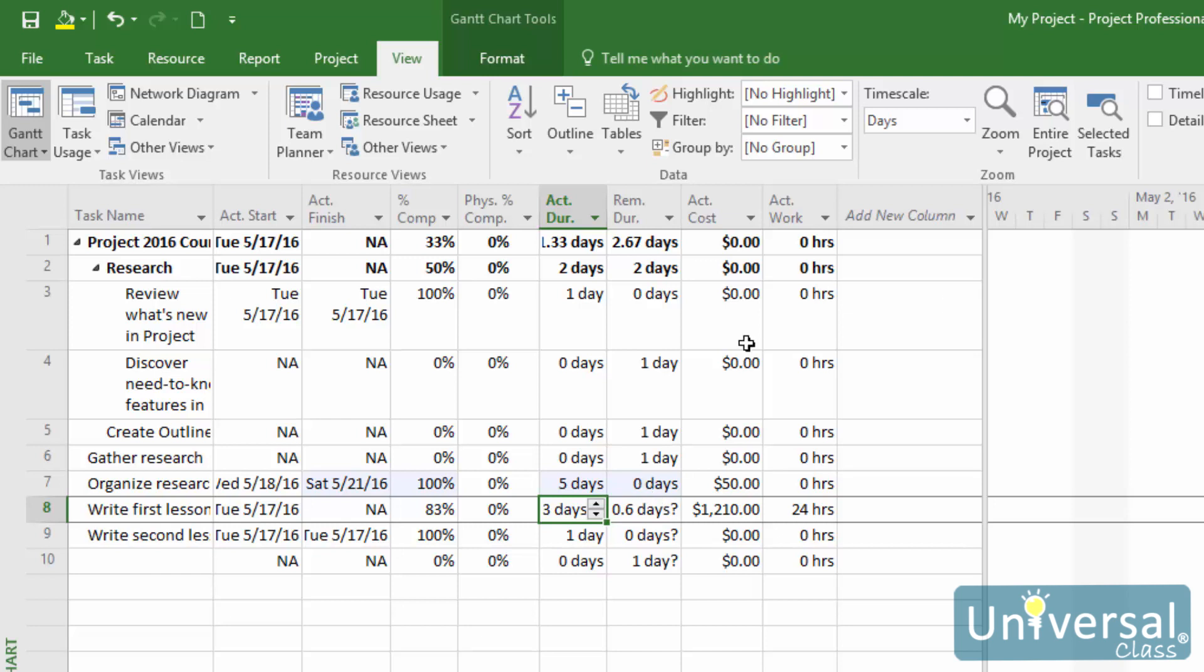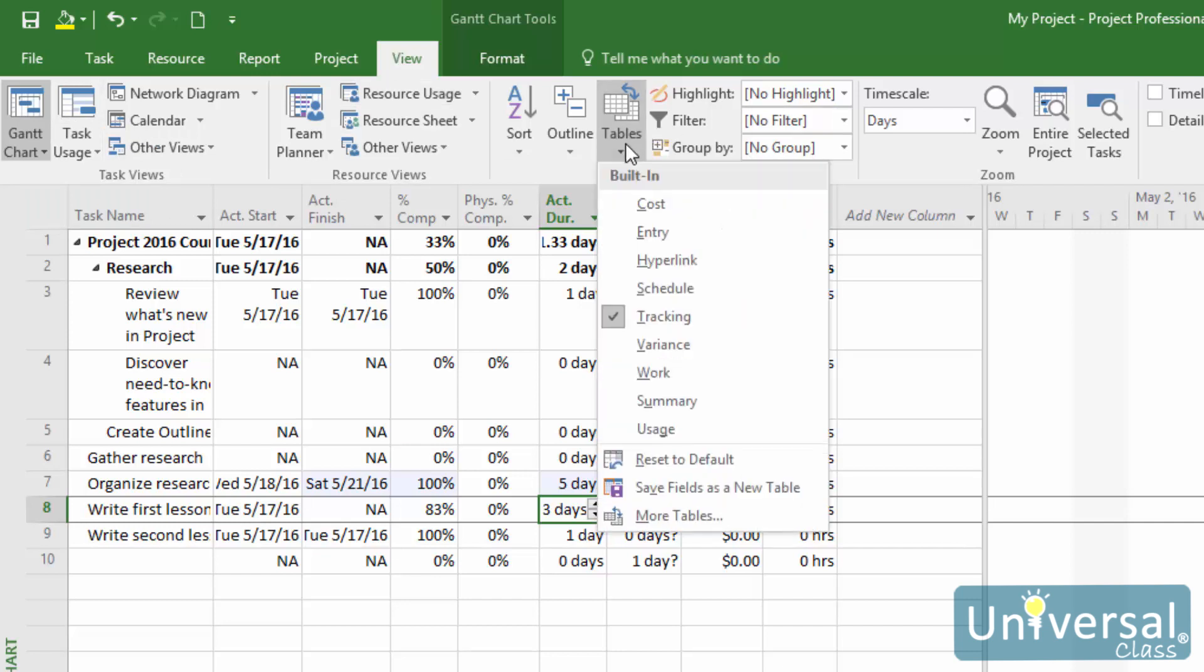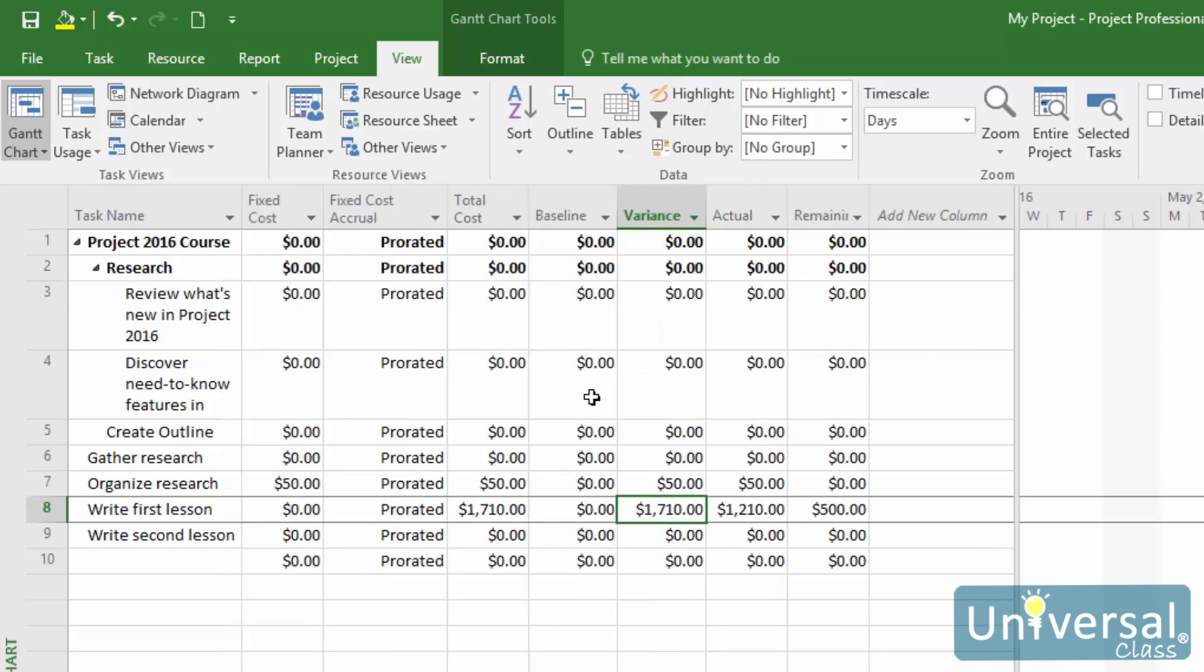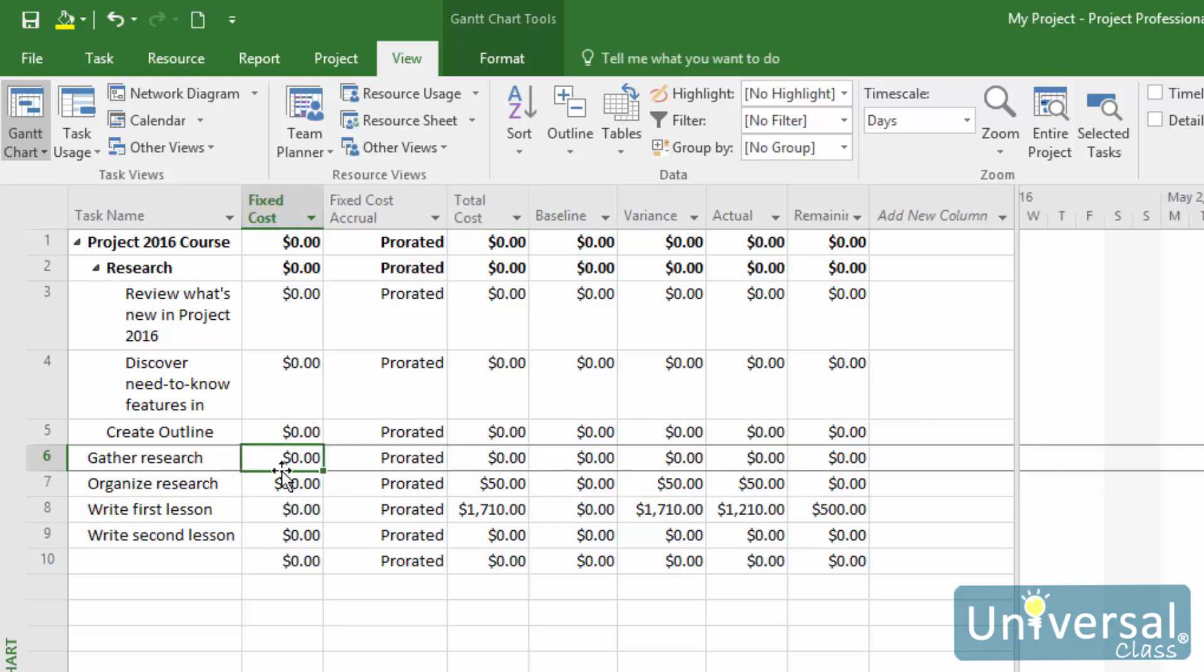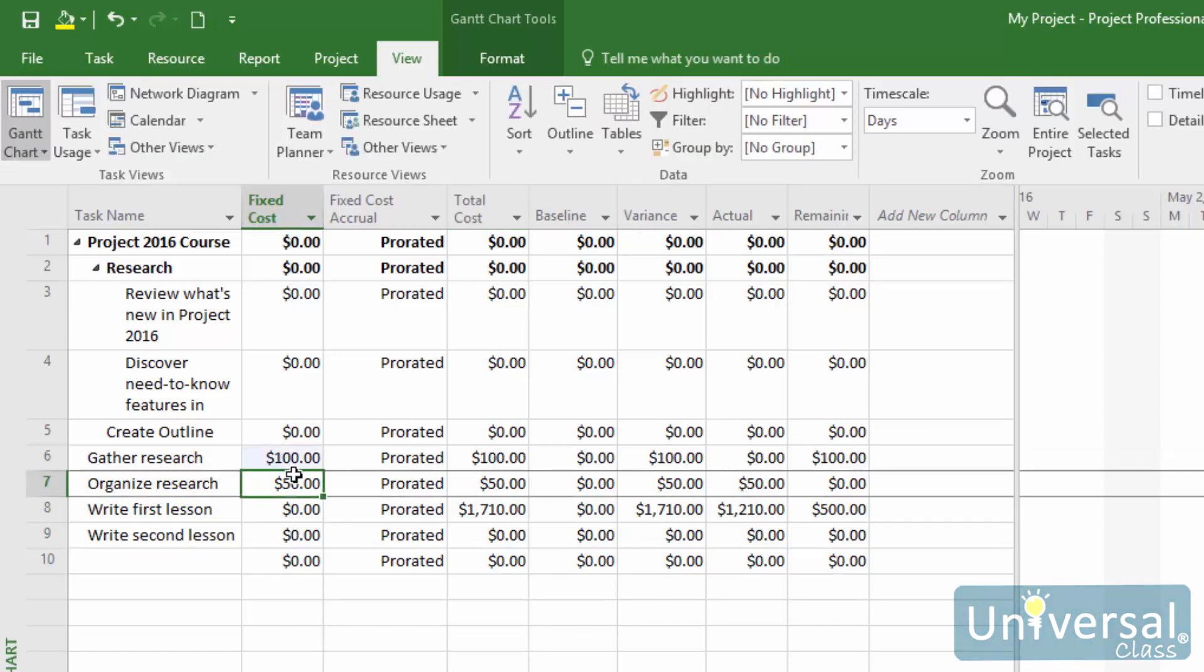Fixed costs aren't changed by time. In other words, they aren't hourly or daily charges—it's just a set fee. To track fixed costs, go to the Gantt Chart view, then go to the View tab and click the downward arrow for the Tables button. Select Cost. You'll then see the cost table in the worksheet area. Go to the Fixed Cost column for the task you need to update, then type in a fixed cost. You can enter several fixed costs. It is that easy.